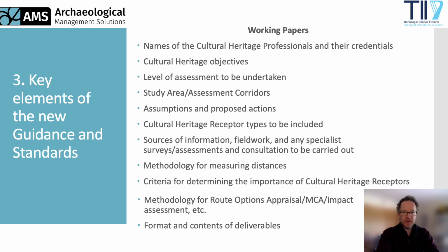At the commencement of each phase or stage, cultural heritage professionals will need to submit a working paper for approval by TII. The working paper is a method statement that briefly sets out the names of the professionals who will undertake the assessment and their credentials, the objectives for cultural heritage, that is, to minimise adverse effects and enhance opportunities,